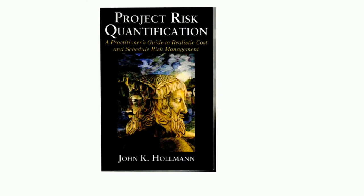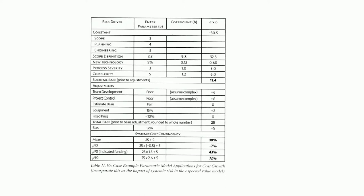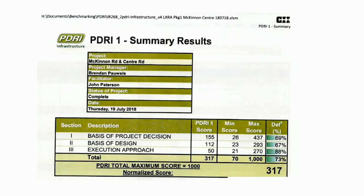This is John's book, Project Risk Quantification. His symbol is Janus — looking to the future and looking back at the past — which is good for risk management. In John's parametric model, it's a case example for cost growth. The systemic risk for cost growth shows scope definition as a key component — quite a large factor. Then new technology, process severity, complexity, team development, project controls, bias, and so on. The ones shown are basically the key elements.